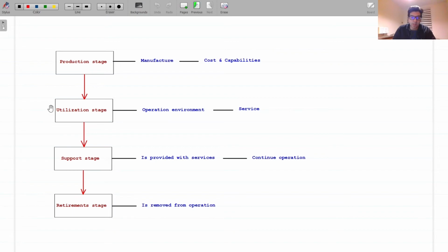The utilization stage is where the system is operated in its intended environment to deliver its intended services. Product modifications are often planned for introduction throughout the operation of the system. Such upgrades enhance the capabilities of the system. These changes should be assessed by systems engineers to ensure smooth integration with the operational system. For large complex systems, mid-life upgrades can be substantial endeavors requiring SE effort equivalent to a major program.